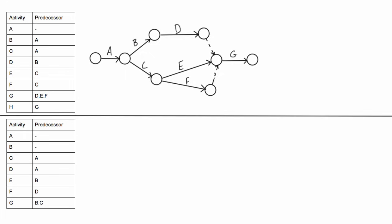Same for F. F must finish before G can start but the way that I've drawn this there's two dummy activities. We actually want to minimize the amount of dummy activities that we're using and so there's a way that we can draw this where we'll only use one instead of two.